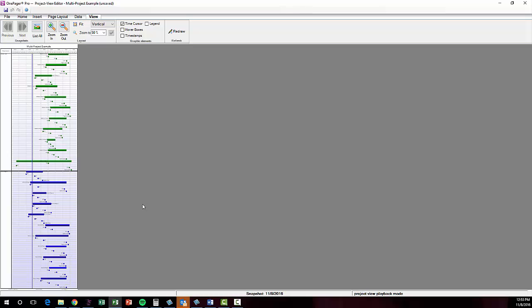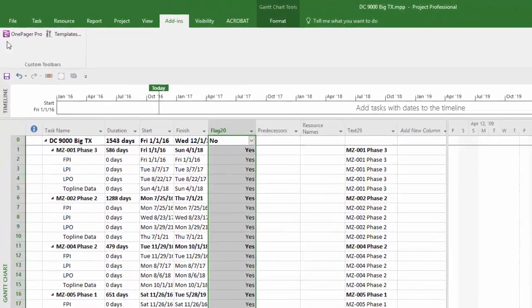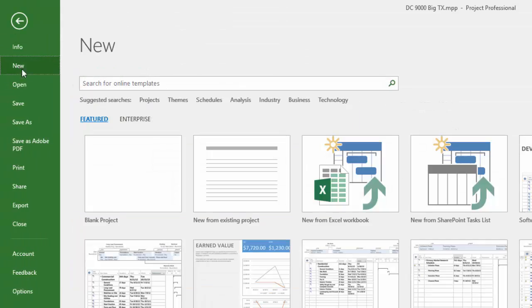The second method of creating a multi-project view involves a master project file in Microsoft Project. To create this, make a new project document.